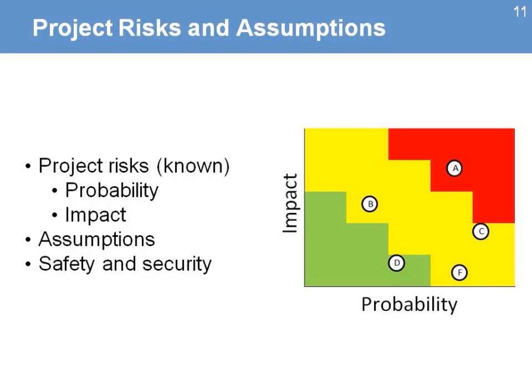You can also make some time to present the risks and assumptions — all the known risks and their probability and impact, as you know them at the beginning of the project. You can also present some of the assumptions and spend some time on safety and security for the team.